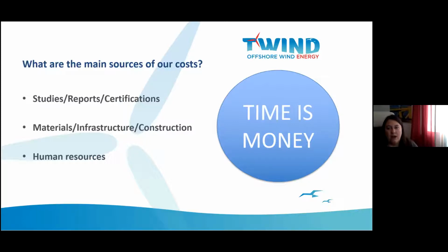For example, we can hire companies that already have expertise on that topic, and it's much easier and quicker for them to repeat the same steps they've already followed before. We can also share information that we have so that they don't have to reinvent the wheel every time we ask them for something. Remember, the company you hired is now part of your project as well. We can also follow existing guidelines. As long as there's some kind of specific guideline for a process, the work will always be easier and faster because everyone is following the same rules.